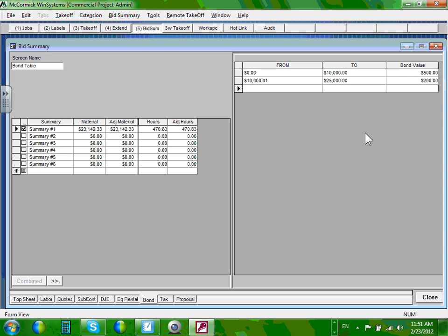Well, there's a bond, like in Minnesota, there's a bond for your company. You have to have a $25,000 bond to practice electrical work in the state of Minnesota. And there's also bonds that you assign for a job. If you lose this job, they take that bond and pay other people if you did not fulfill your obligations, and so forth.